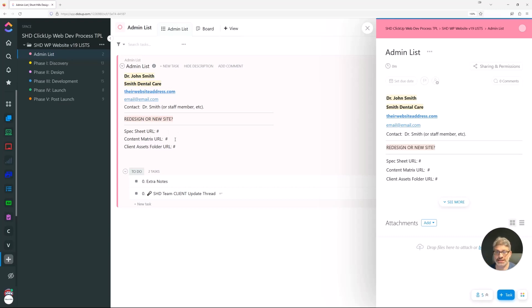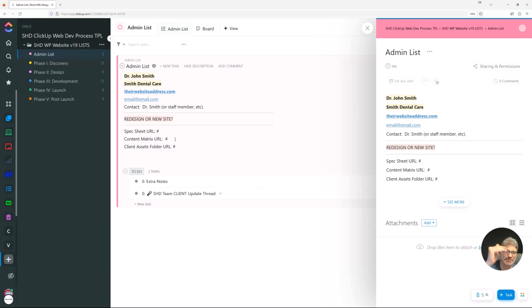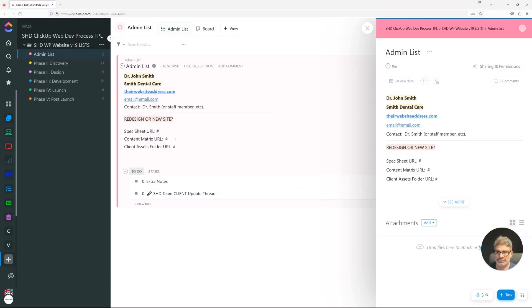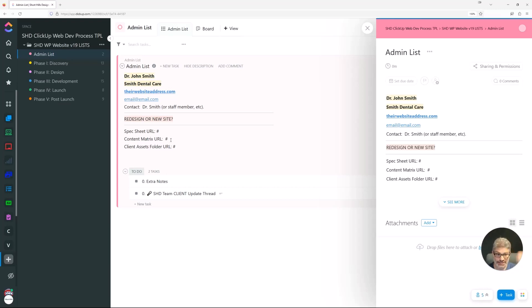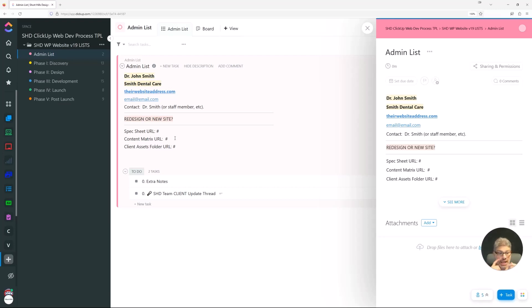We've got a content matrix. That content matrix is, if we're building a new site, what are the pages on the new site and what's the status of those pages? Are they ready? Do they need to be reviewed? Is there an error? Do they have to be 301 redirected? And also, if it's an existing site, if we're redesigning or they have an existing site, we've got to do redirects. That's in this content matrix as well. It lets us keep track of every single page that we're working on and the status of that page. We also use it to design the navigation.